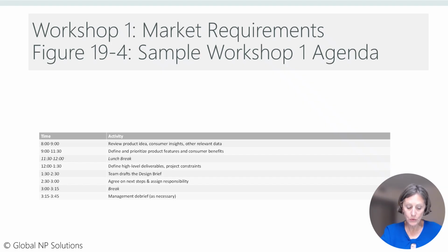to assign project resources. During the preparation for Workshop 1, the Chief Engineer also identifies and secures the team rooms where the project will be carried out. Sometimes this is called a war room, and in traditional lean manufacturing terminology, the common room is called the obeya. Kanban and Scrum boards adorn the walls of the common room, and core team members are assigned to this work location for the duration of the project. A shared space facilitates cross-functional discussions necessary for an innovation project.